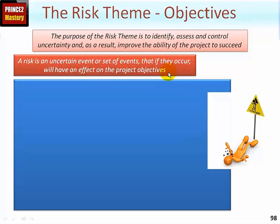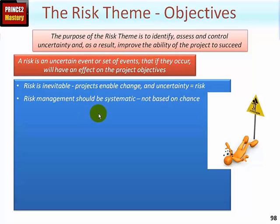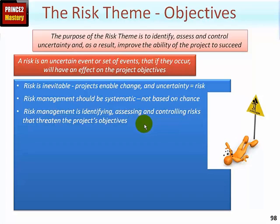An issue, by contrast, is something which has already happened and we need to deal with. Risk is inevitable because projects enable change, and hence you will always have uncertainty. Risk management should be systematic, not based on chance. The Prince2 approach is: first identifying all known risks, then assessing them in terms of their probability and impact, and then controlling them by taking appropriate responses, because all risks threaten one or more of the project's objectives.